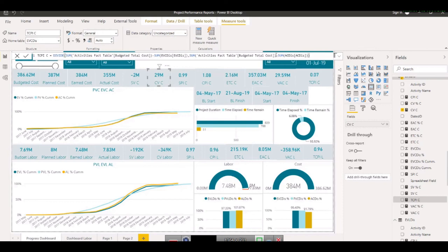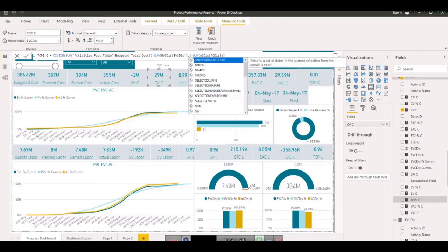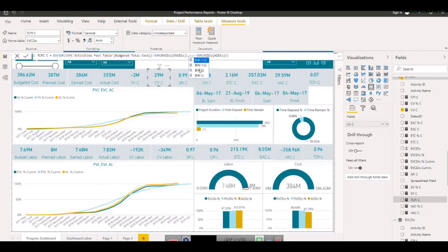So what will happen if we bring, let's say, estimated completion, so you can check that as well. Estimated completion of cost minus this. So this will also give us, based on the current situation, what our predictive KPI is forecasting. It is forecasting that we will end up with this amount. So based on that, what is our TCPI? In order to finish at this amount, you need to do this kind of work. Your CPI should be 1.08 in the remaining work, so that you can finish at the estimated completion point.